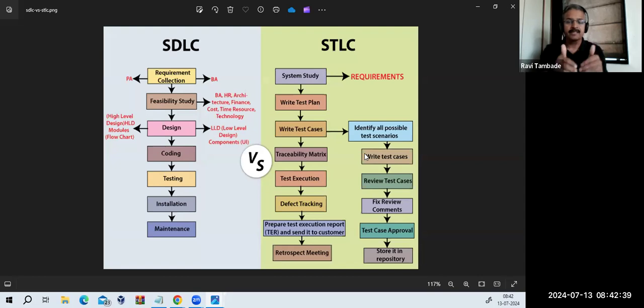As the developers develop something, the tester will test it, and the operations engineers will deploy it, and then there will be a sprint review meeting. Then there is a retrospective meeting, and again the input will be taken. During that time, they come to know what the problem is, what extra things need to be added, and what existing things need to be updated or adjusted. Your next sprint will start with the new user stories and the existing modified user stories. In that whole area, you'll find the Scrum team, and your testers will be part of it.